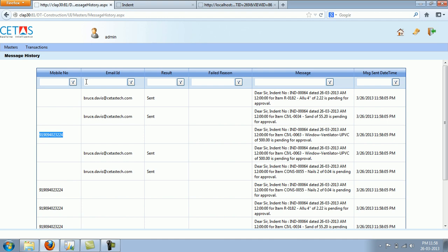For example, only for purchase orders more than a particular value, say $10,000, you can set up an alert to be sent to the chief of purchasing or the CFO, or you can set up an alert whenever a purchase order which is expected to be delivered on such and such date has not been delivered, so that an alert is sent to the vendor, resulting in better follow-up.